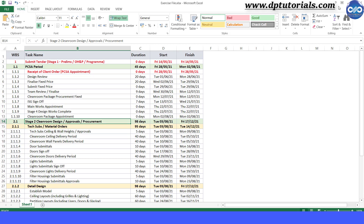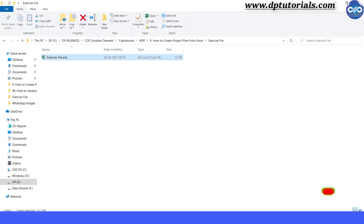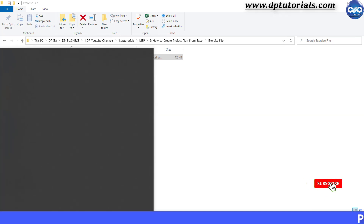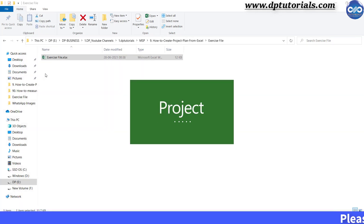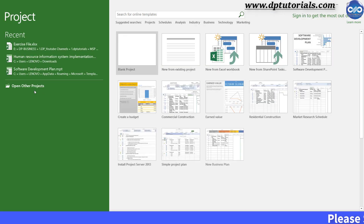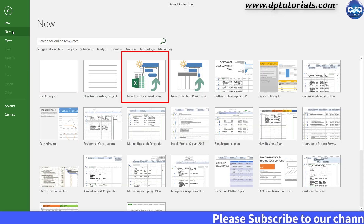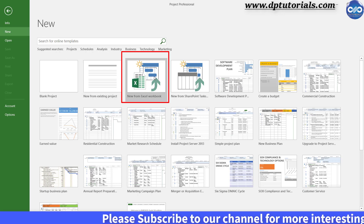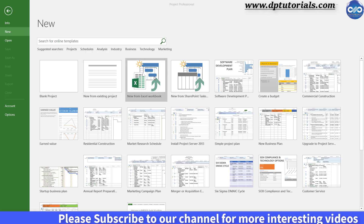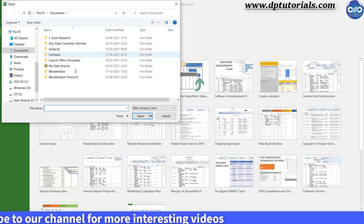Now let us close this Excel workbook. Now open Microsoft Project 2016. Click New here and select the option New from Excel Workbook — this one.